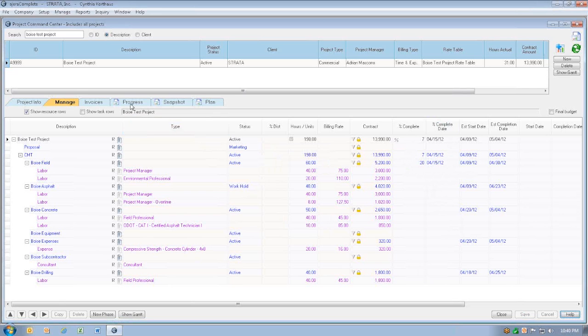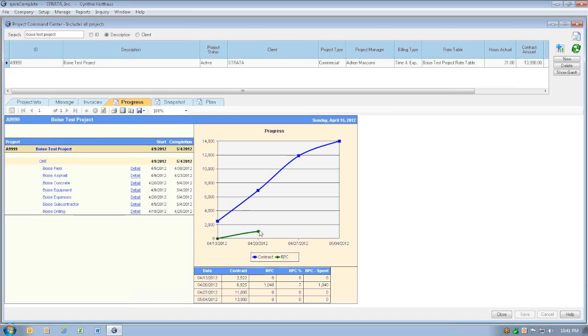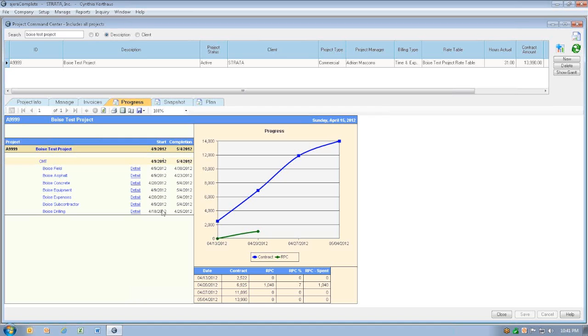Let's go back to the Progress tab one more time. Great. So now it's marked our reported percent complete. And so now we can see, based on what we reported percent complete, only about $1,000 done, when we anticipated being closer to about $7,000 done. Over here on the left, we see our beginning and end dates for all of the phases that were previously blank.